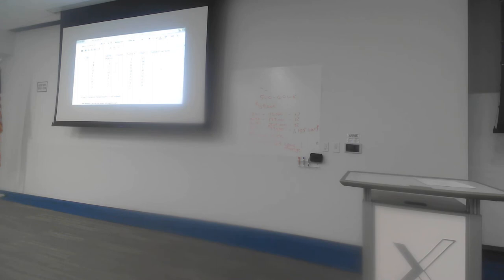This will give me the expedite cost slope. So again, if I go through the example of activity E, just to check my figures, the crash amount, which is €40, minus the normal amount, which is €20, gives me 20. Then I divide that by the normal duration, which is 10, minus the crash duration, which is 6, that gives me 4. 20 divided by 4 gives me 5, which is the expedite cost slope of that activity.